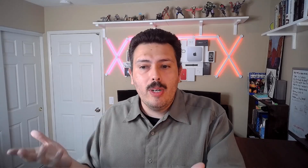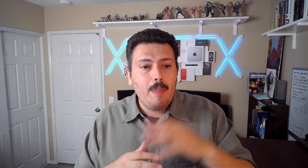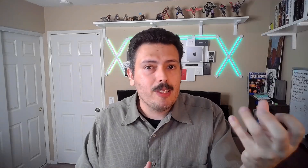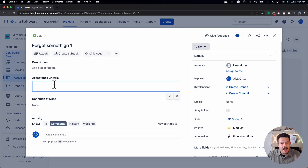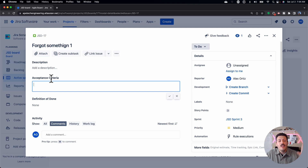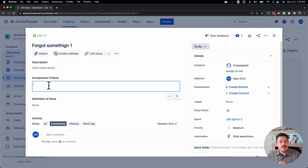Acceptance criteria is going to basically tell your team: here's how we're grading it, here's what acceptance means. These are essentially the requirements — if you want my buy-off for the story, for me as a product owner to say 'yes, you have my two thumbs up of approval,' it's going to be based off the criteria I define in the acceptance criteria. So having this field added is so that you can provide that guidance.